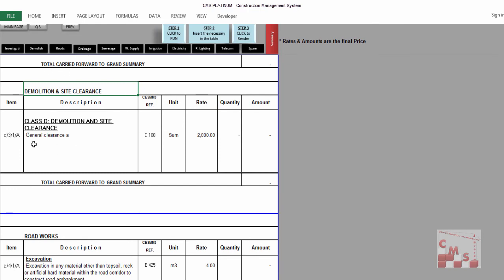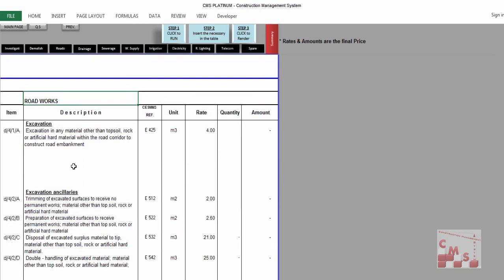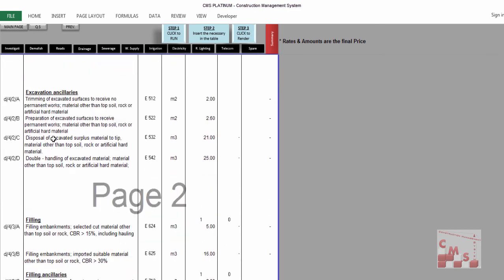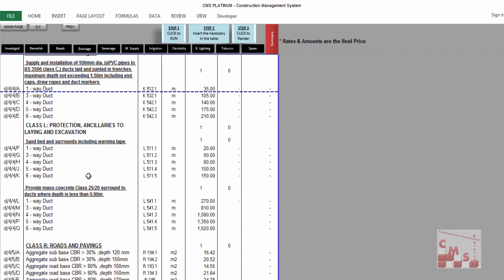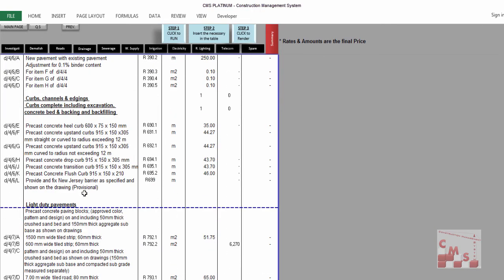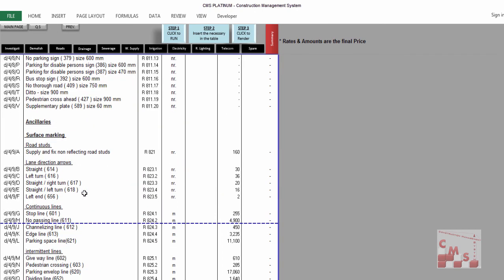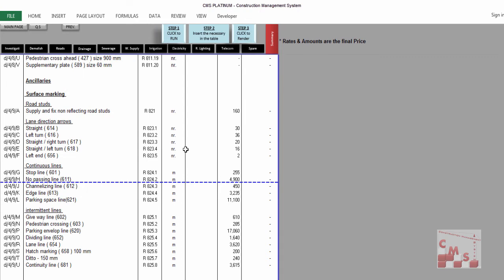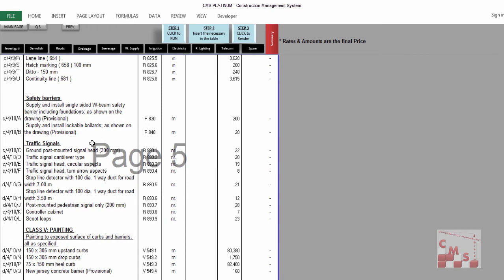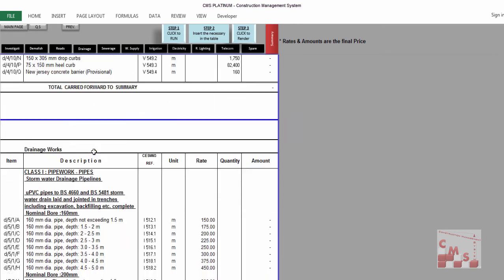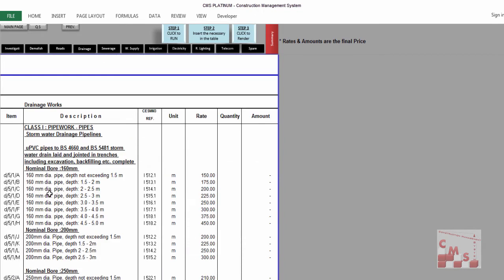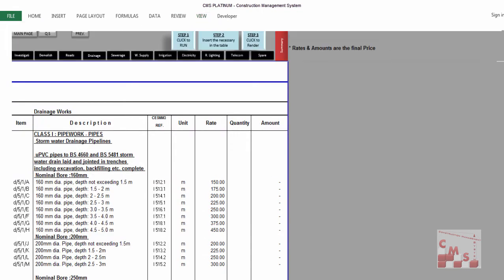For demolishing, insert whatever you need and add rows as required. For roads, CMS provides descriptions for road excavation, filling, pipe works, manholes, ducts, protection, roads, bathing curb and channel, light-duty pavement, and all road requirements. You can keep, change, or modify according to your requirements, update the rates and quantities, and add rows as needed — normal work in Excel.